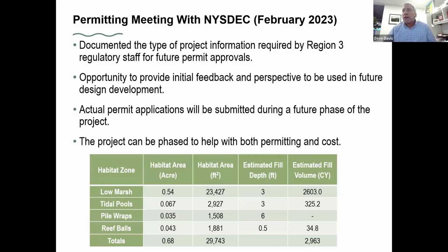I think the other key takeaways that we heard from the agencies beyond the in-water features was a discussion about some of the over-water features like the boardwalks. The DEC felt that we would have to make a very strong case to justify those types of structures because with boardwalks over water there are shading impacts. There's a lot to consider by building those boardwalks, so we would have to make a very strong justification on why we needed them and what value they would bring to the project.